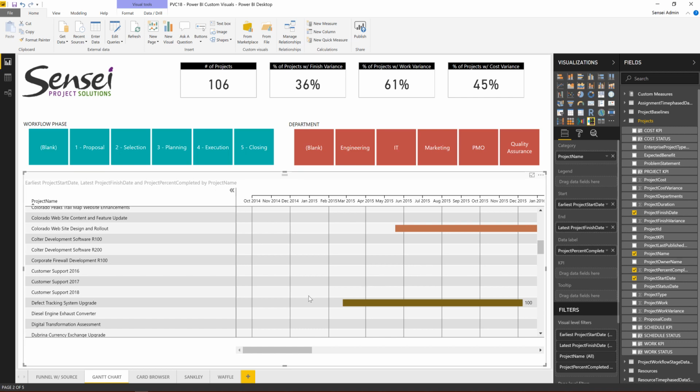And for us to finish this particular visual that we are discussing, I will also be working on the KPIs. So what we need to do here is, the KPIs require us to have... I have used in my context a calculated field because I didn't have this field available in my data source in my project online environment. So I did create a calculated custom field. Actually, I created three. I have my work KPI, schedule KPI, as well as the cost KPI.